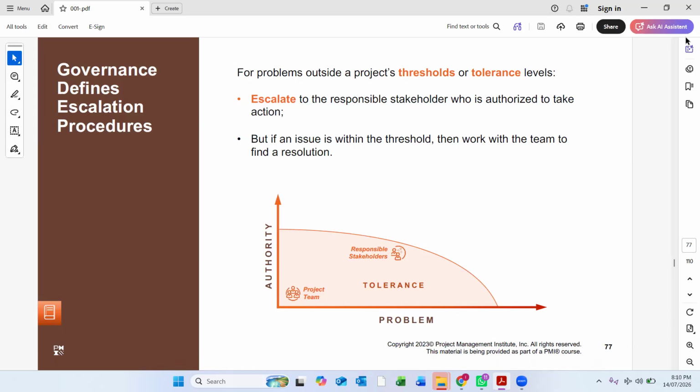But even in infra projects, if the contractor faces problems with authority approvals, like design NOC, construction NOCs, or permits, they should escalate to the client. They use the word escalate in the meetings. If it's not in control, escalation should be there, otherwise it will create a big problem.